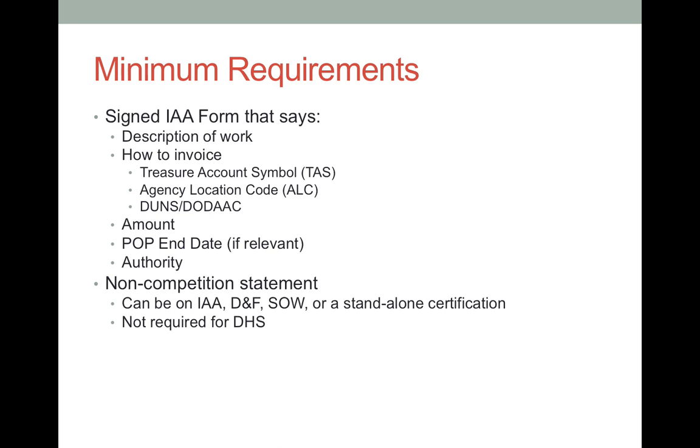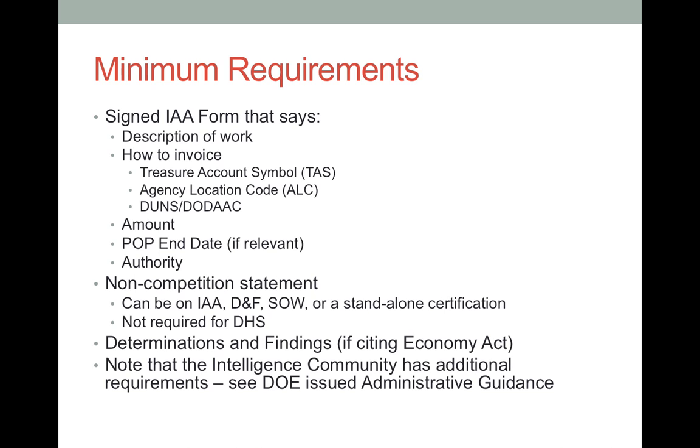A non-competition statement must be included somewhere in the package. It can be in the description in the IAA form, on the DNF, in the statement of work, or as a standalone statement. If the Economy Act is being used by the requesting agency, a DNF as described in FAR 17.502-2 must be provided to the servicing agency.